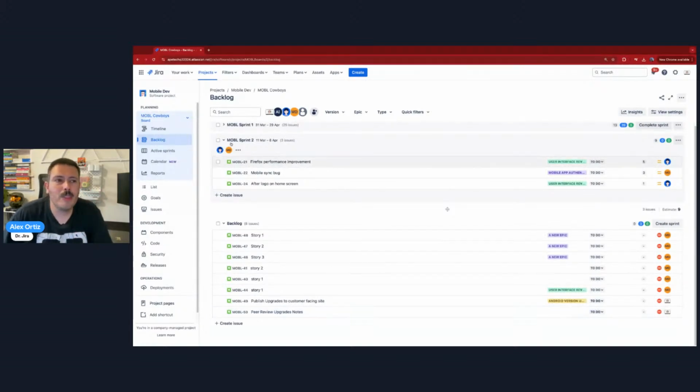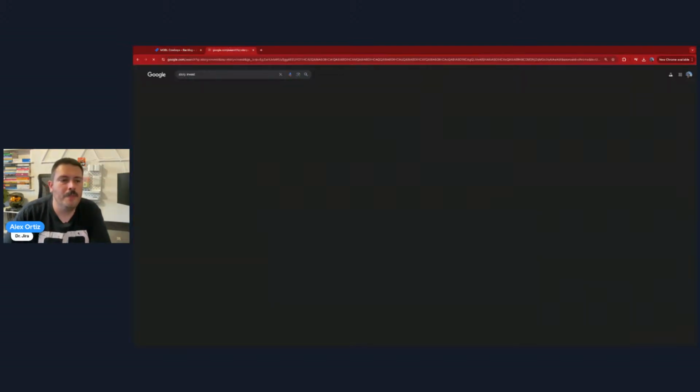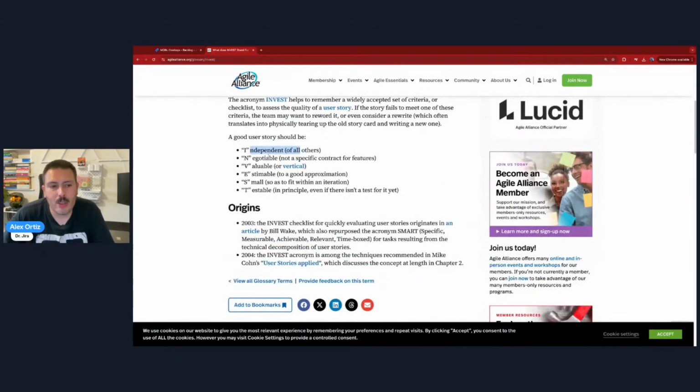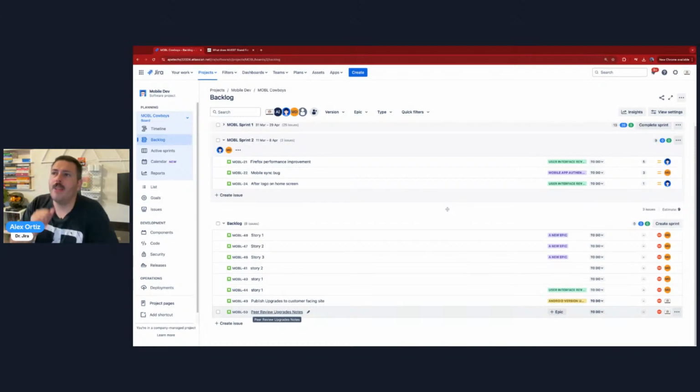if they're not following the INVEST principle, I don't know if you guys have ever looked at story INVEST, if you guys aren't following the INVEST principles here of a story should be independent, negotiable, valuable, estimatable, small, and testable, if you're not following these things, then your stories are going to be ambiguous most of the time. I'm generalizing here, folks. But for the most part, when we have very ambiguous, ginormous stories, this is where, if we're not careful, we run the risk of not being able to successfully complete our stories in time for the sprint to be finished.